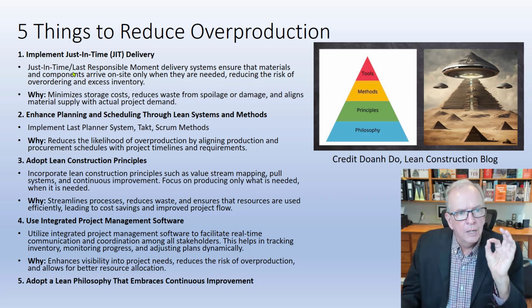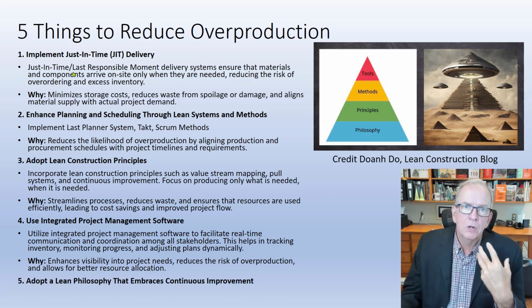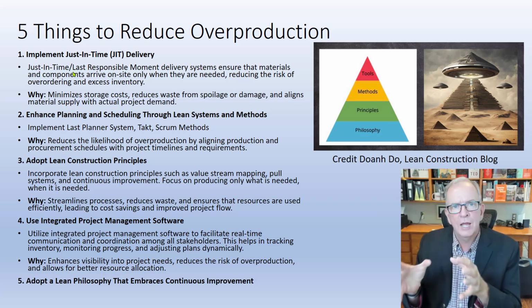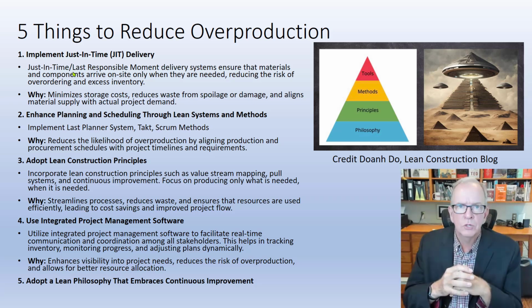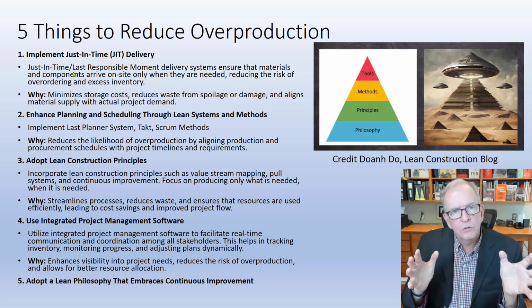Because there's other waste that impacts, which is next week's one, workers waiting for work and work waiting for workers. So we want to look at just-in-time and developing better systems of getting materials when we need it. And that means we've got to think about our procurement processes, our relationships with those vendors. What's the appropriate amounts for every delivery? Like my picture earlier on with the landscaping and all the skids. Was it best to have all of those skids delivered at that time?